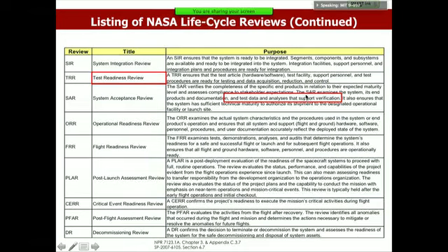So at CDR, you say this is the testing we'll do. At the test review itself, you say everything is ready for the tests to happen, and then you do them. And at the system requirements review, you look backwards and you say what tests actually happened, what's the documentation, what were the results. Are we ready to own the asset now? Does that make sense? Okay.